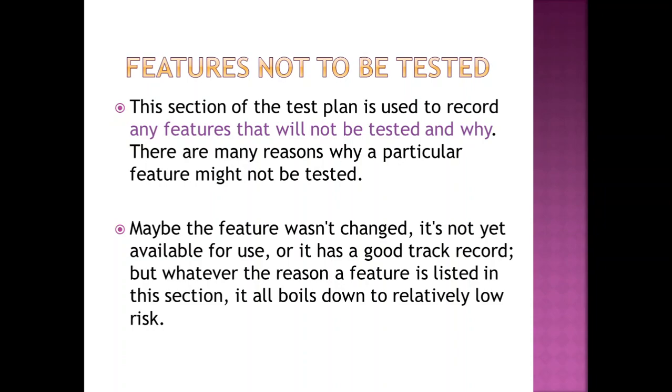I would say not many stakeholders would be so interested in looking at this particular section, because we are kind of saying that no, these features are not going to be tested. But the actual point is, if it is a low risk feature, or a feature that has been tested multiple times and has already been standardized or stabilized in your product, then you can neglect that feature.